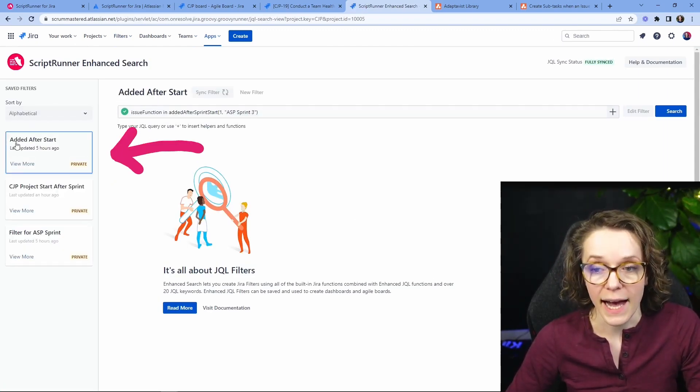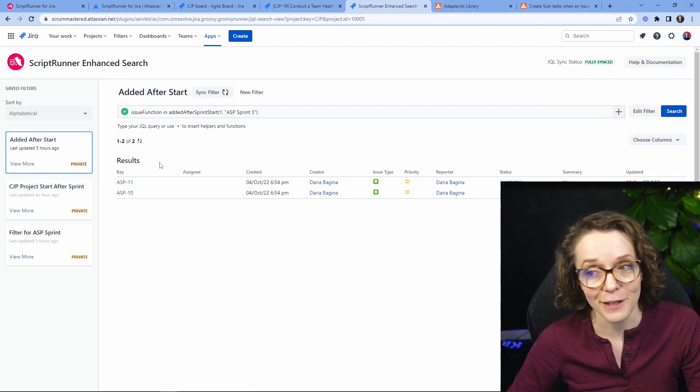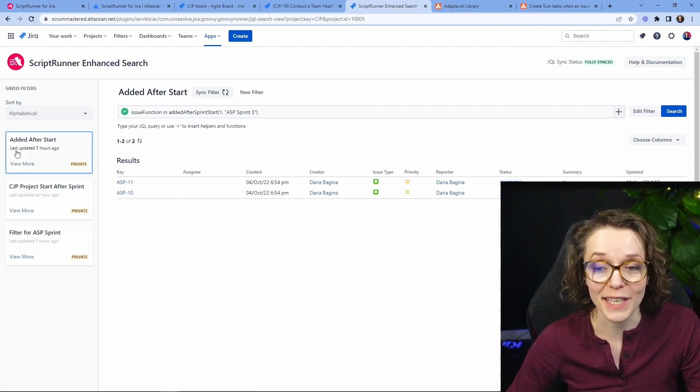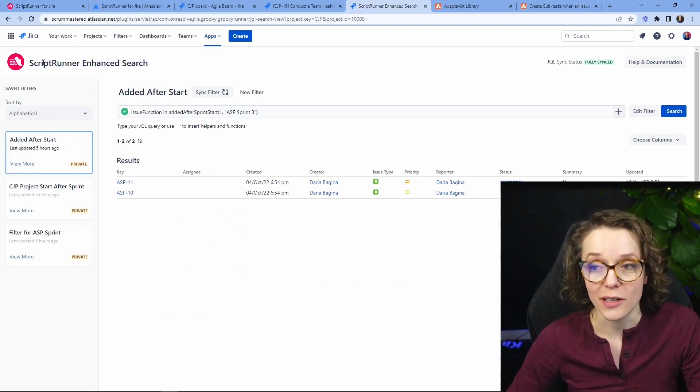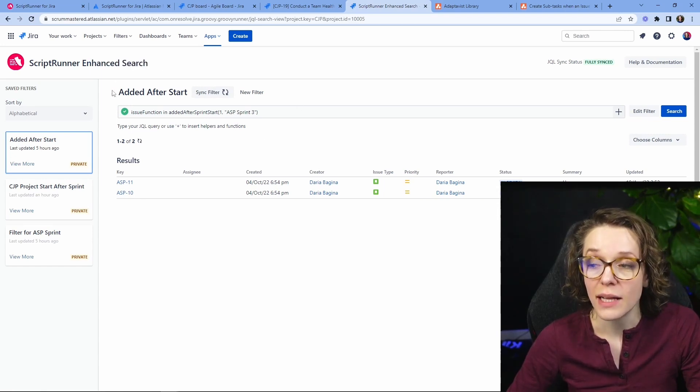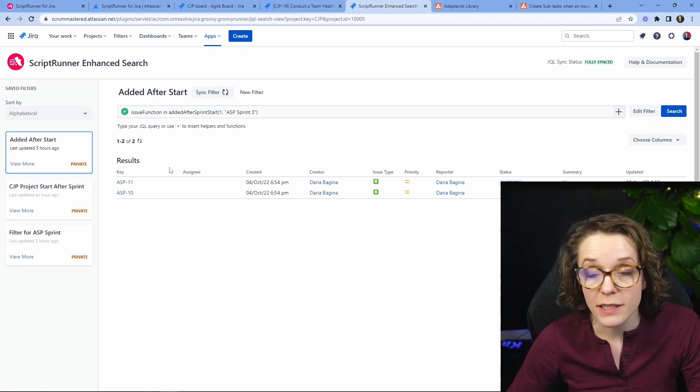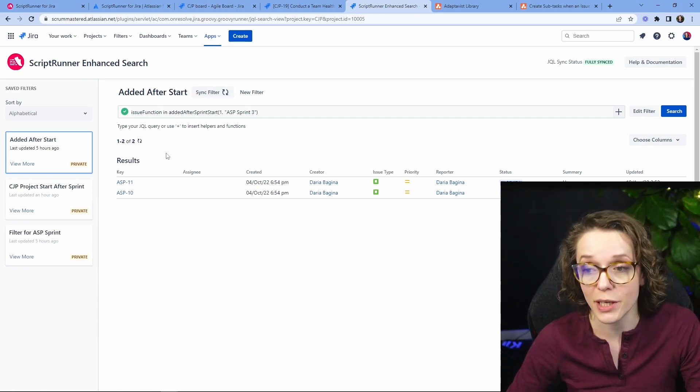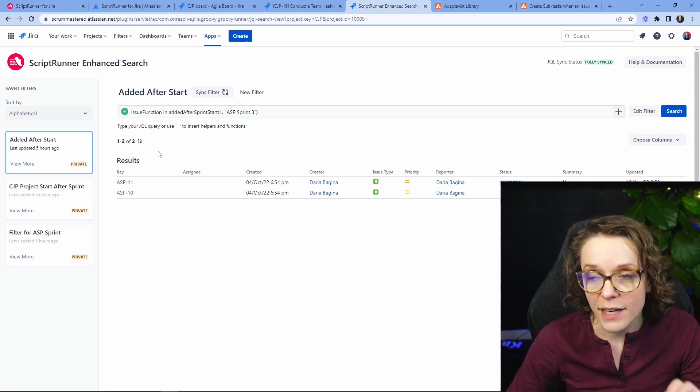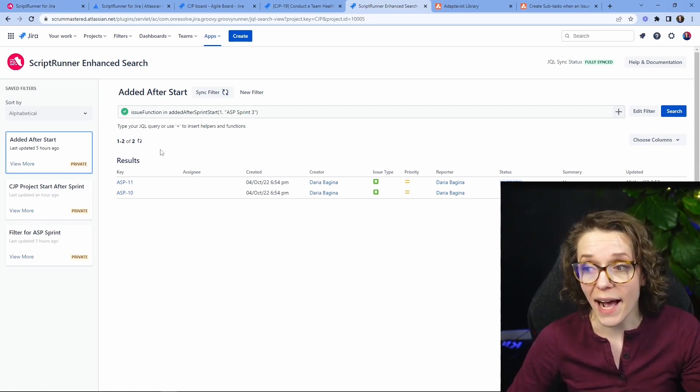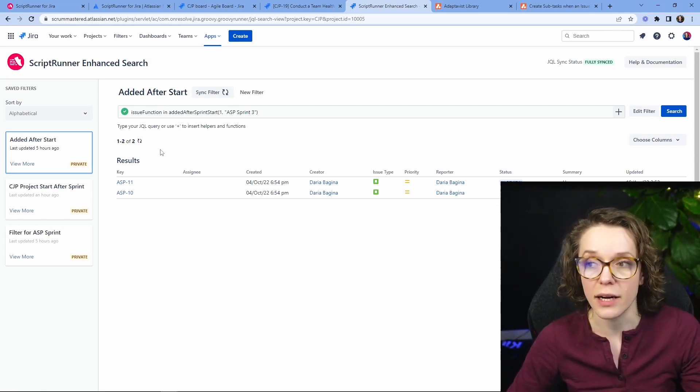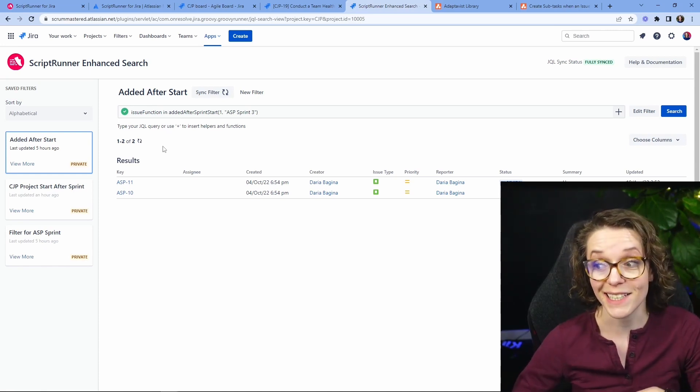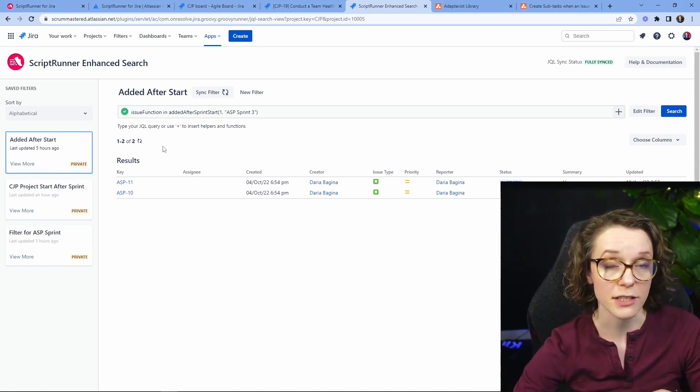More specifically, added after Sprint. I think this is a very important one. So this is a function that you can add into your Script Runner Enhanced Search Console and basically for every Sprint in your team you can look into what has been added after you started Sprint which is a very important metric to track especially if your team is struggling with changing priorities, constantly changing priorities.